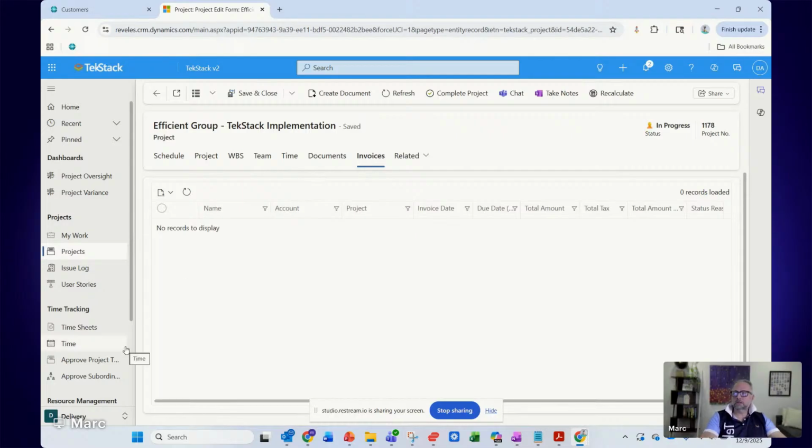So once the time entry has been approved, basically the process is to have somebody in some kind of oversight role. Typically the project manager is the first line of approval. Most of our customers have a second approval. It could be a finance resource, it could be the PMO. There's usually somebody in the organization that has a look-see before things hit an invoice. So we have a little section in our software called revenue.